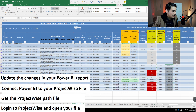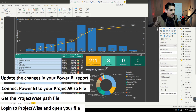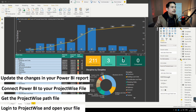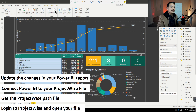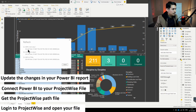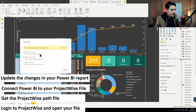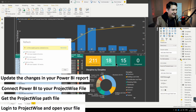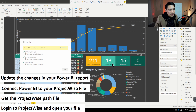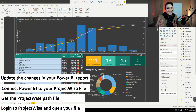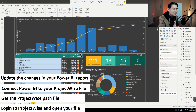Once you've saved the file, you can come back to Power BI. At the beginning we only had three documents submitted and zero under review. Now I tell Power BI to do a refresh — it pulls data from Work Area One, Work Area Six, and so on. Right away, your report is updated with all the new submitted and review documents from your Excel file on ProjectWise.